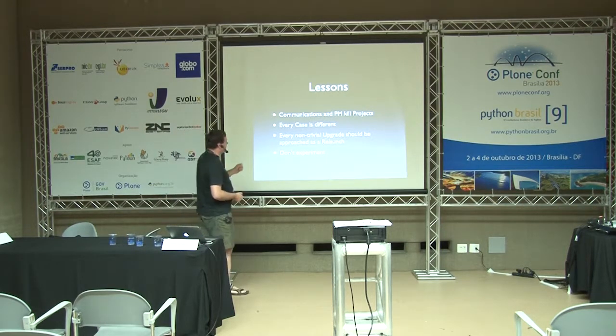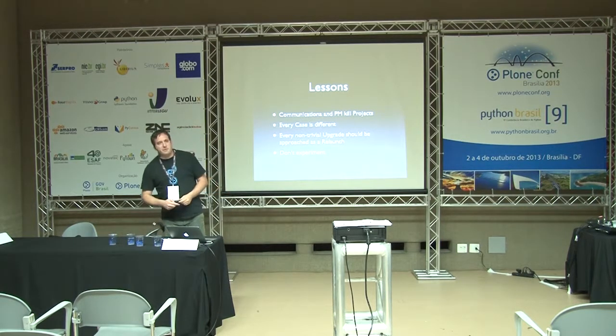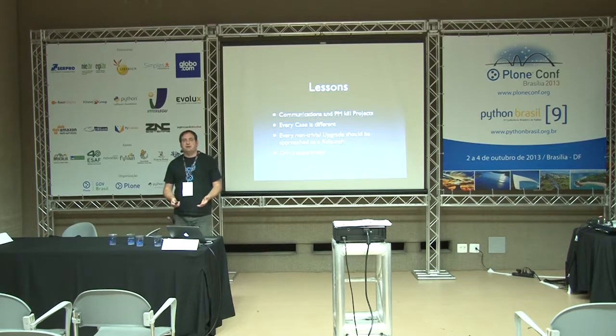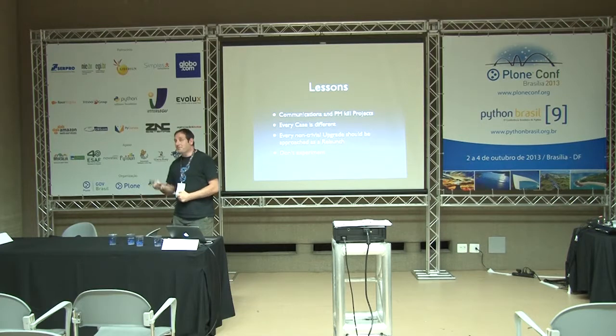This is important, I think. Every non-trivial upgrade should be approached as a relaunch. That makes your life much easier because you can communicate changes that they might otherwise perceive as a problem. If they approach their migration as a relaunch, they expect stuff to change. And they might actually see that the collections are much better now.